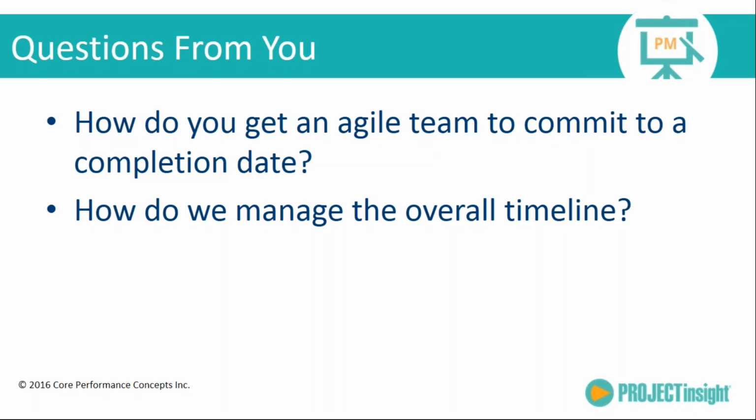So if you're just changing it to change it, and you currently don't have any problem, you're absolutely going to have issues. Because if people don't recognize that there's a problem that needs to be solved, then they're not going to want to change. But if you can get people to say, hey, things aren't working the way that we want them to, and everybody agrees with that, then you can offer an alternative like Agile, and everybody agrees to give it a try and move it forward. So you're never going to get people to change unless they agree that there's a problem to solve. Excellent question.